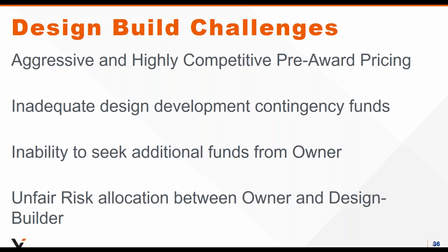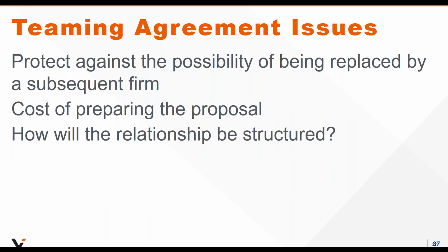That is indeed a very difficult situation in a design build environment because the owner's attitude is that, hey, we've given you a job, you said you could do this, and that differing site condition that you run into, that's part of the risk that you assumed. In a design bid build environment, the contractor would be able to seek those additional funds and it wouldn't be a source of friction that involves the design team, right?